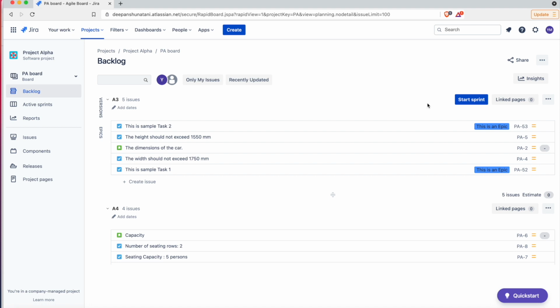If in your scenario you are not able to start or stop a sprint even after you have assigned the Manage Sprint permission to the user in all the projects which are returned by the filter query of your board, then it is possible that your sprint is not originating from that particular board, but from a different board. In order to handle such a case, you need to find the board from which your sprint is originating, and then you have to repeat the steps that we have just discussed.